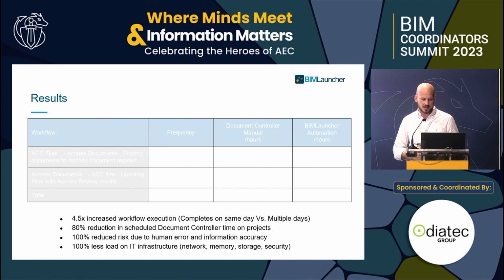The second workflow, the frequency of that is each time a review completes, the document controller would spend 5 hours typically transferring those comments back from Aconex into Autodesk. BIMLauncher does that in 1 hour. So in terms of total times, BIMLauncher across the 2 workflows was 6 hours. Document controller, you were looking at 31 hours.